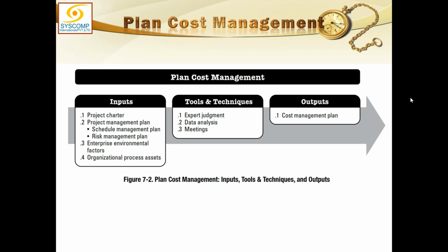Specify tracking methodologies and the earned value management computation equations for calculating project estimates, like estimate at completion. This is the forecast of how much it is likely to be spent in the current situation.